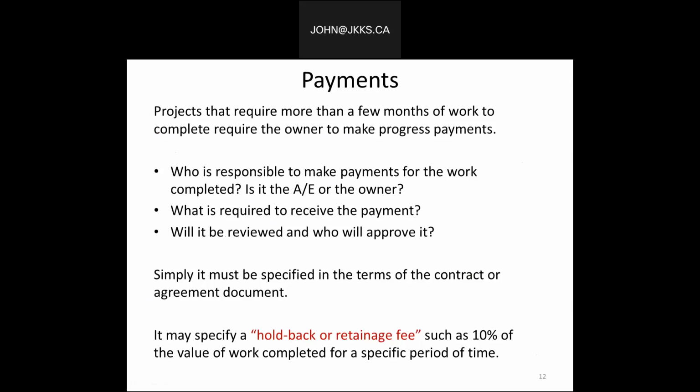So again, who is responsible? What is required? And will it be received, and who will approve it? Simply, it must be specified in the terms of the contract or the agreement documents. And of course, it may also specify a holdback or retainage fee, such as 10% of the value of the work completed for a specific period of time.